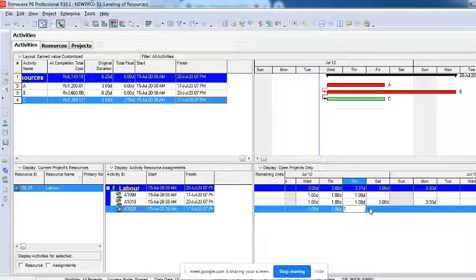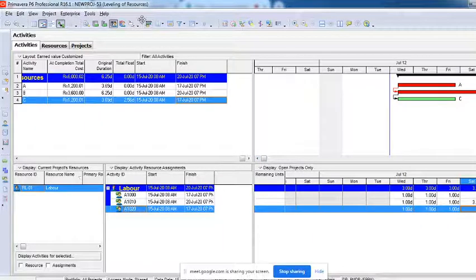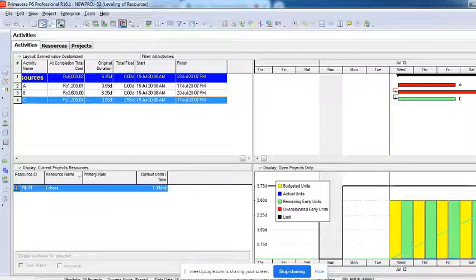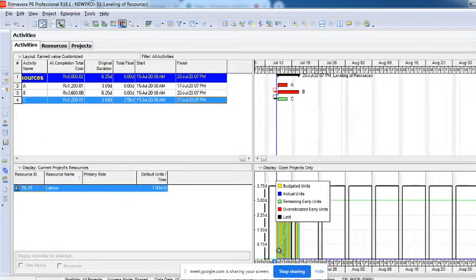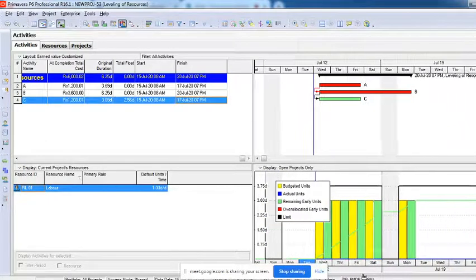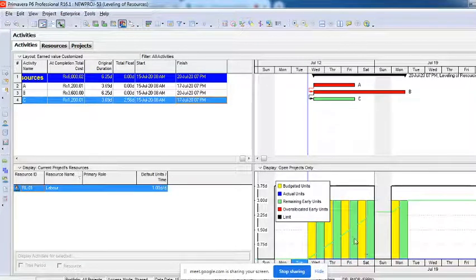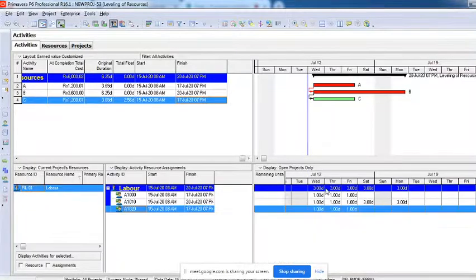Now you can see here I'm equally distributing for these 3 days, that is 3, 3, 3, 3, but here it is showing 3.69 because of the calendar that has been assigned by default. Now this changes here, you can see the over allocation that it was showing here is not there now. Why? Earlier it was showing some over allocation. No, there is no over allocation right now because nothing is used more than 3 people per day.